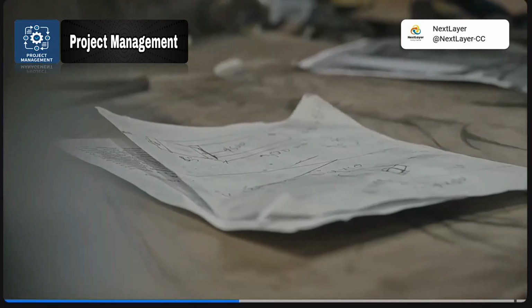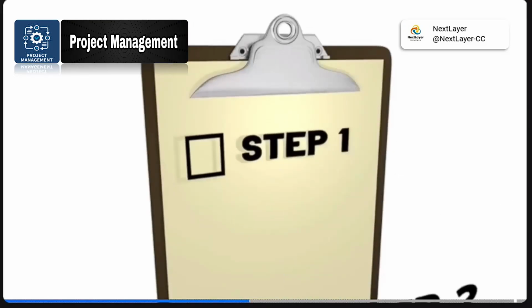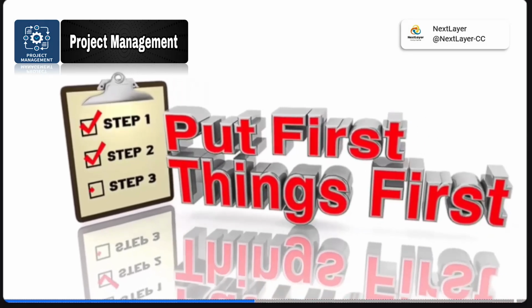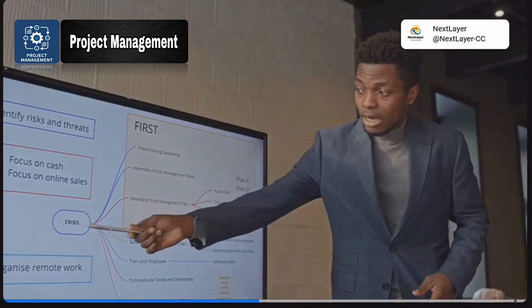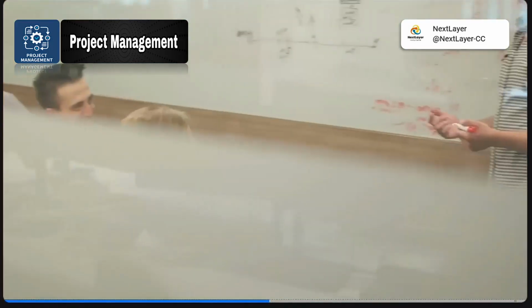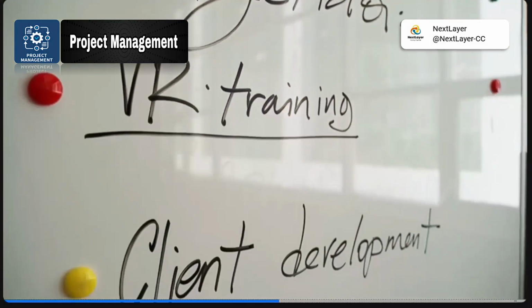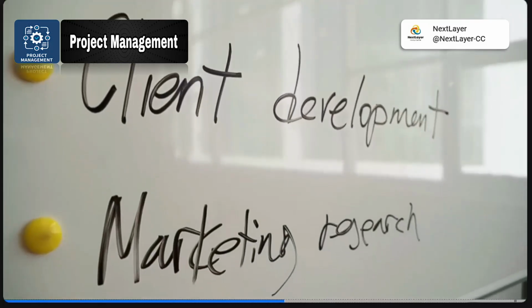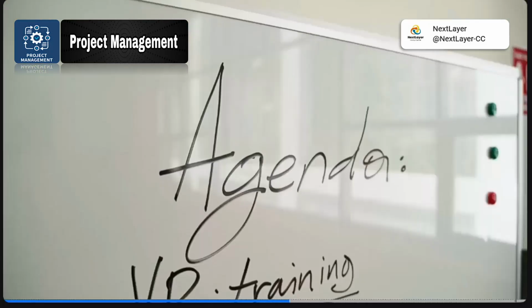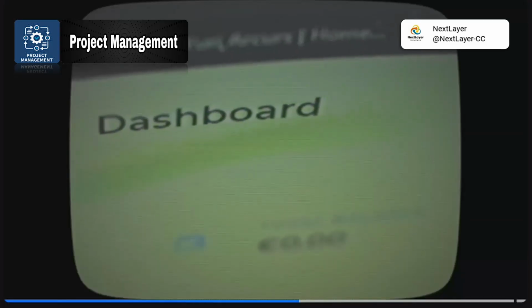Once that's done, work towards developing a preliminary project plan. Decide what happens first, what comes next, which steps can run in parallel using different resources, who will do each task, and how long each task will take. After reviewing the plan with your team and stakeholders, adjust timelines and schedules to match the available resources. This updated version becomes your baseline plan, which you'll use to measure and track progress throughout the project.